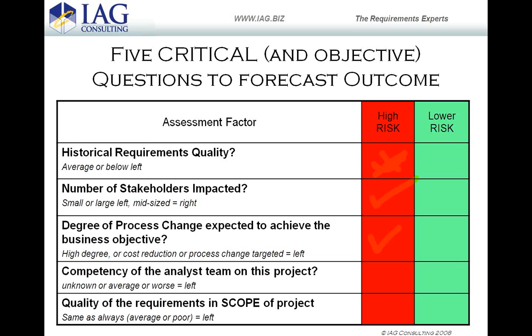I want you to think about the last strategic project. What did I say about few stakeholders? Okay, so it's bipolar, Dan. If you have a very low number or very high number relative to what your project typically does, then it is high risk. Oddly enough, very few stakeholders for a large spend on a project is as risky as very large numbers of stakeholders for that same large spend. It is a bizarre outcome. It is what it is.